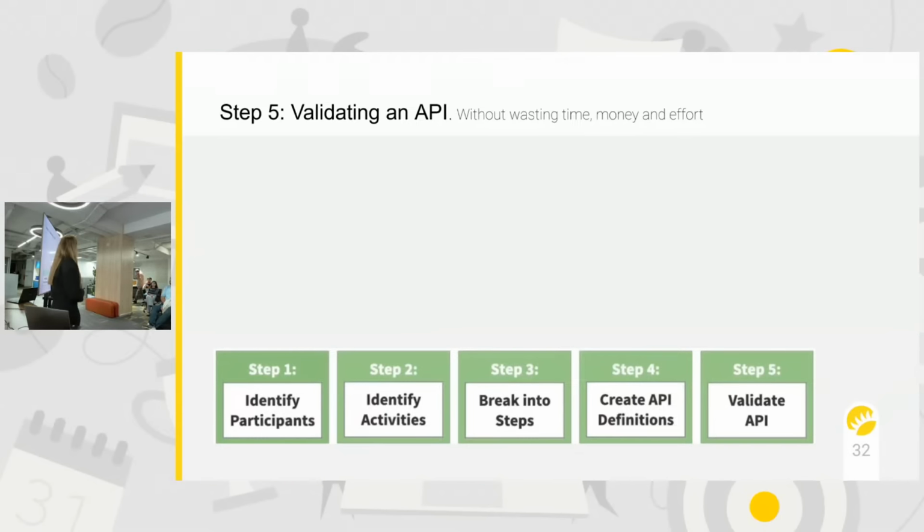In validating requirements, we actually have some solution, and we ask them, okay, we had these requirements, and we thought of this solution. So is this solution right? So by validating, we have a solution. We defined APIs, and we review it, try to validate it with maybe our BA/SA team lead, backend tech lead, front-end tech lead, or senior backend and front-end developers.